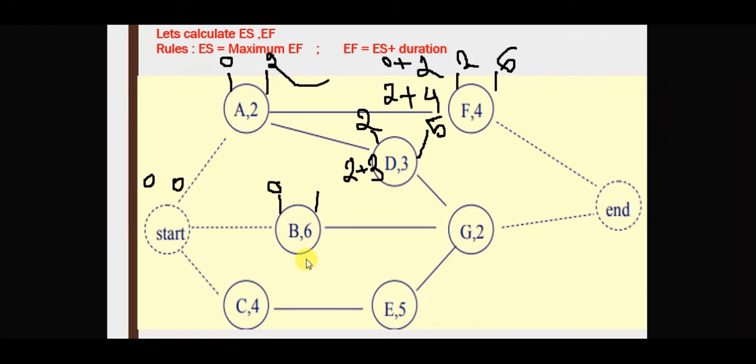Take the maximum. The earliest finish is earliest start plus duration - 0 plus 6 equals 6. For activity C, the earliest start is 0 plus 4, which equals 4. Take the maximum - 4 plus duration 5 equals 9.